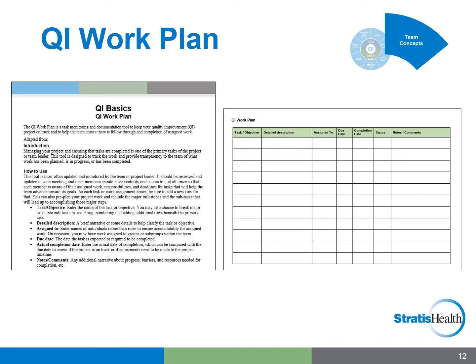Work plans come in many formats, varying level of detail, and the one included here is very straightforward and easy to use. Typically, the team leader owns this document, and it should be shared and reviewed with the team at each meeting to create accountability and ensure that progress is being made, and any barriers to specific tasks should be discussed.